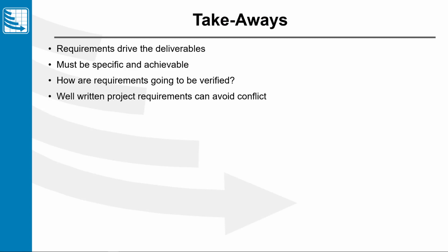So this completes our very high-level overview of requirements management. Like I said, this can be a very complicated thing. People make careers out of managing and tracing requirements. But the requirements drive the deliverables. That's what we're getting out of this. The requirements drive the deliverables. The deliverables are going to drive the work, and the work's what we're going to capture in the schedule. So that's why we're talking about this.